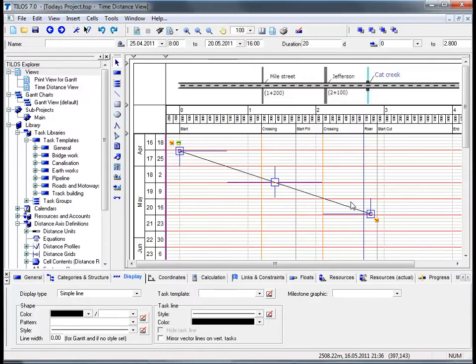And the other way of amending data is purely and simply by grabbing the edit lines and changing the duration of the task and reducing the length of the task accordingly. And then, as you can see, all amendments that have been made graphically using the mouse have automatically been changed in the preset toolbar at the top of the screen.